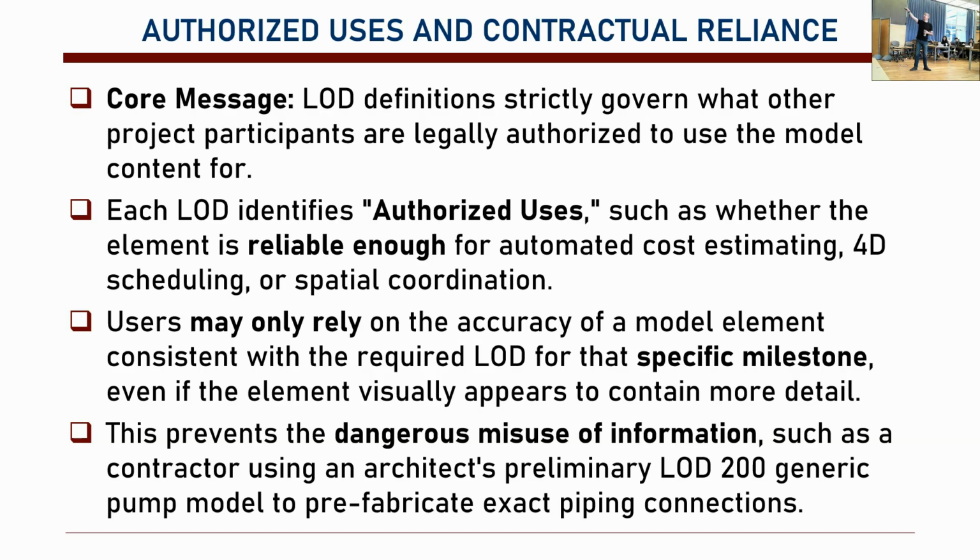Okay, so that is the idea. Authorized users. So each LOD identifies authorized users, and they should be reliable enough for automated cost estimating, for the scheduling, or spatial coordination. We can only rely on the accuracy of these elements consistent with the required LOD for that particular milestone.